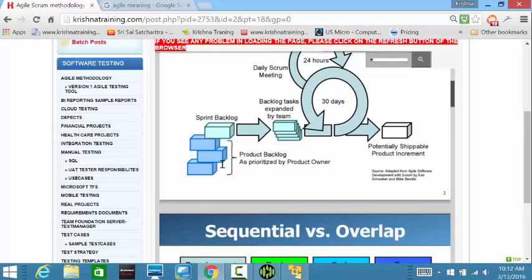So the whole work would be properly divided, where you will be considering the rework of your previous sprint based on the feedback. So there is some percentage allocated to the rework and also to the development of user stories in that particular sprint. Clear? So that's how it would be carried out until 10 sprints from both the teams.